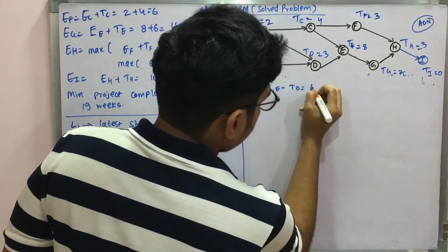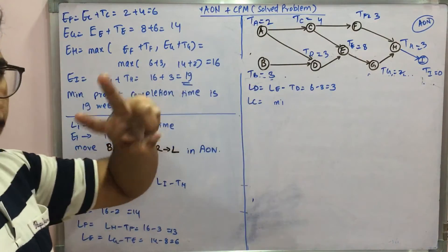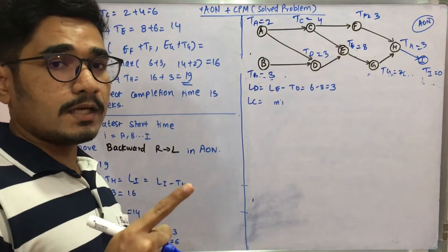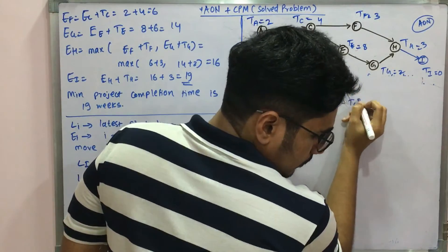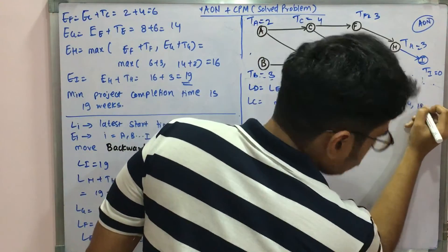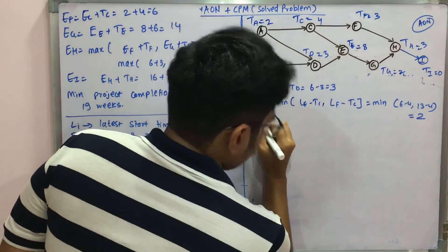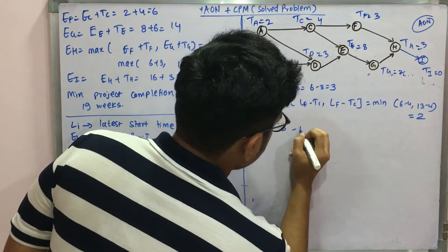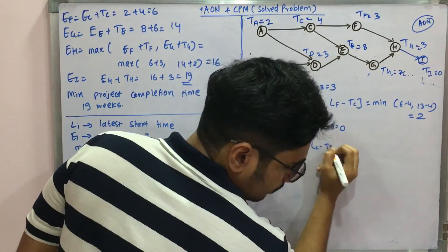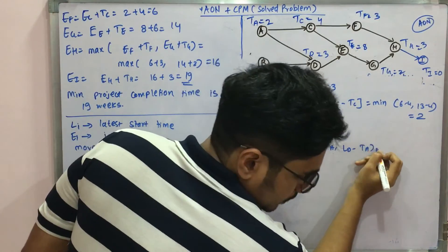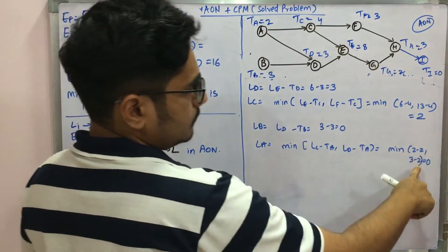Continuing, LD = LE − TD = 6 − 3 = 3. For LC, which has two successors, you take the minimum: min(LE − TC, LF − TC) = min(6 − 4, 13 − 4) = min(2, 9) = 2. LB = LD − TB = 3 − 3 = 0. For LA, with two successor paths: min(LC − TA, LD − TA) = min(2 − 2, 3 − 2) = min(0, 1) = 0.